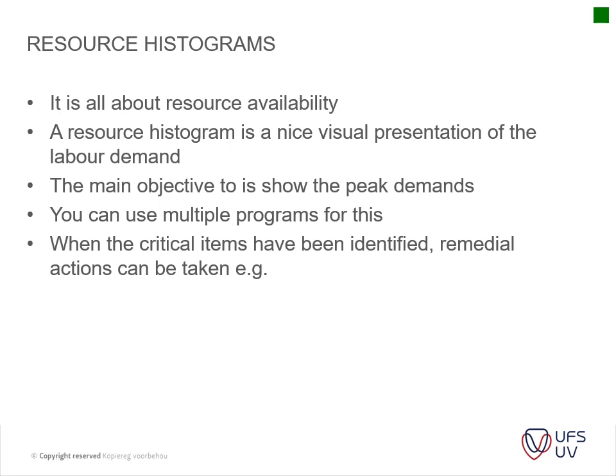Do you guys know what a histogram is? Good. It is all about resource availability. A resource histogram is a nice visual presentation of the labor demand. The main objective is to show the peak demands. You can use multiple computer programs for this.